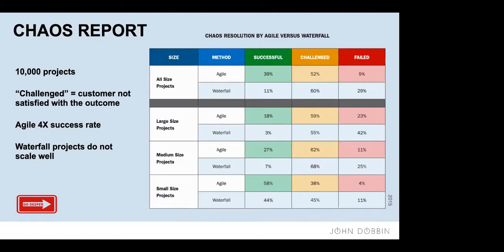And so I think this is just something to be very aware of, that Agile can help improve customer satisfaction, but it's not a given. Agile teams must involve the customers very, very closely for this to happen. And a lot of the Agile coaching I do, they are running Scrum or they're running Kanban, but they're not talking to the end customers at all. They're not engaging. And I would tell them that they're not doing Agile.